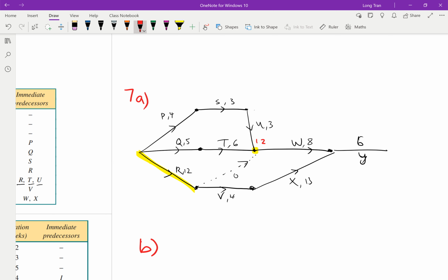All right. Well, as let's say from R12, that's 12 there. But then if I connected this, this would be 4 plus 12, 16. And we're trying to find the longest route, aren't we? So 4 plus 3 is 7. 7 plus 3 is 10 now. So far, 16 might be one of the biggest routes. But then to get to this point over here, that would be 16 plus 13, which gives you a 29. All right, and then 29 plus 6 is then 35.